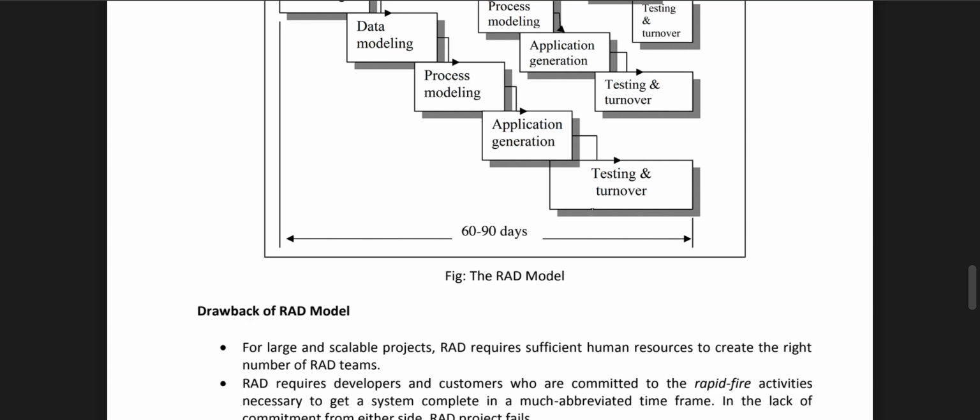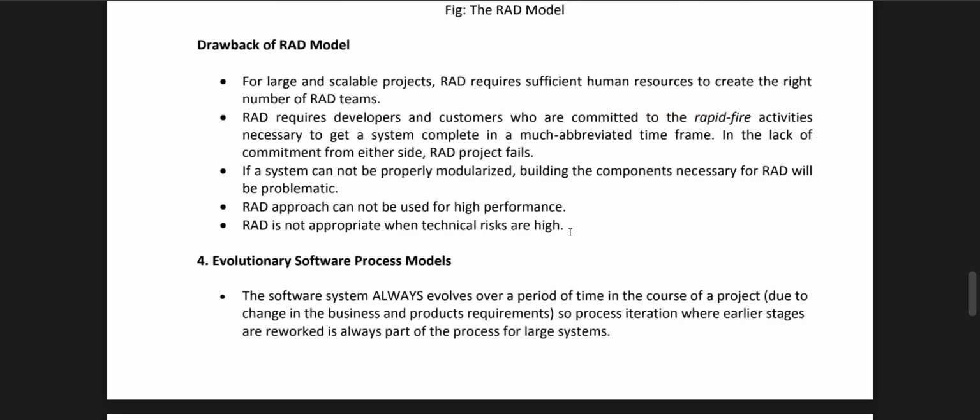Drawbacks of the RAD model: for large but scalable projects, RAD requires sufficient human resources to create the right number of RAD teams. RAD requires developers and customers who are committed to the rapid-fire activities necessary to get the system complete in a much abbreviated time frame. In the absence of commitment from either side, the RAD project fails. If the system cannot be properly modularized, building the components necessary for RAD will be problematic. A RAD approach cannot be used for high performance. RAD is not appropriate when technical risks are high.